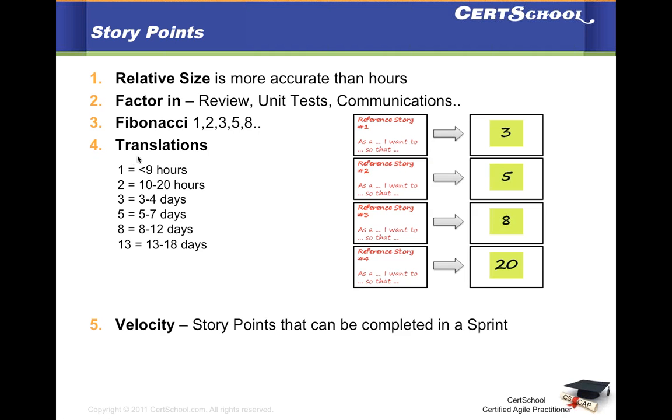But when you're using burn down, you have to specify the remaining time in your story. As you're working on a story, you're logging time. We looked at Tempo as a tool. When you're logging time in Tempo, it is subtracting that time from the story and adjusting the remaining time.